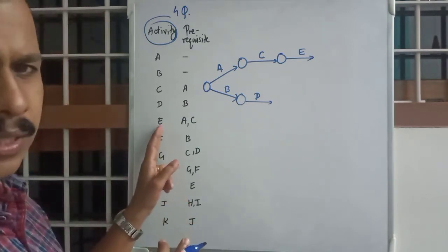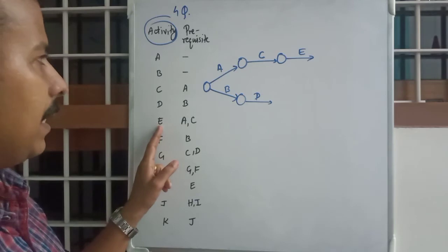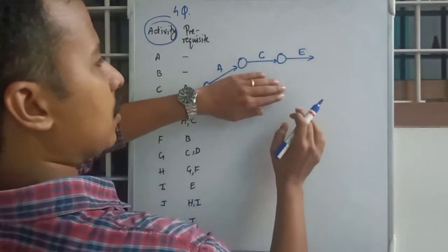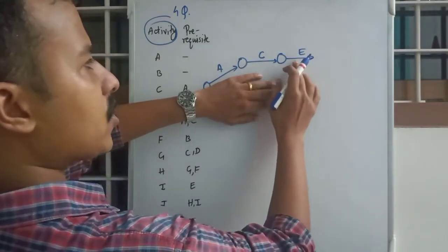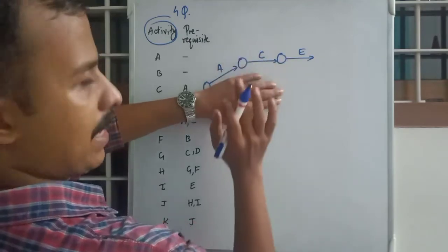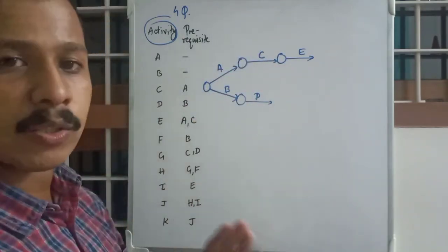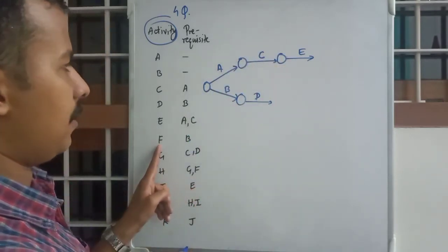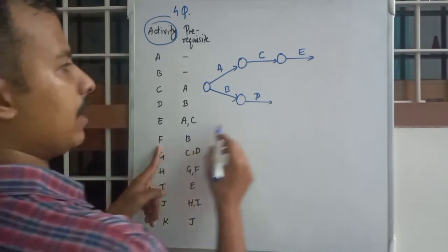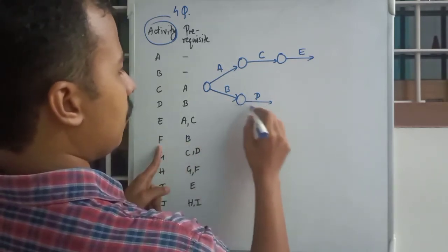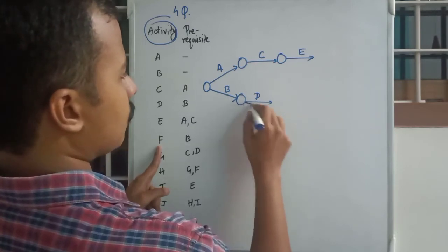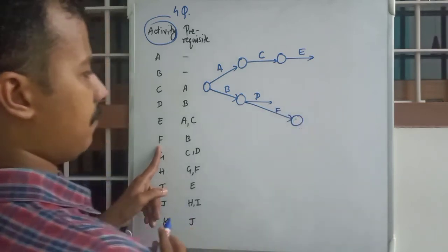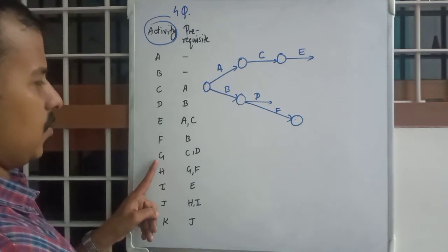Okay, so I hope there is no confusion. E, you have prerequisites A and C. So with this section, the main logic is you can start E only after completion of A and C. So don't bother to connect two activities or two events or anything. Just connect that either. F, the only prerequisite is B. That is F.